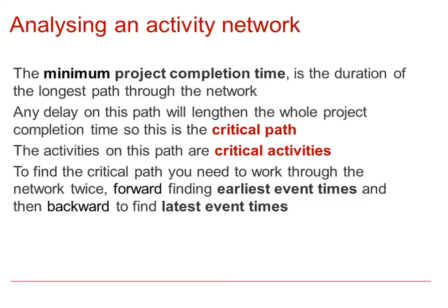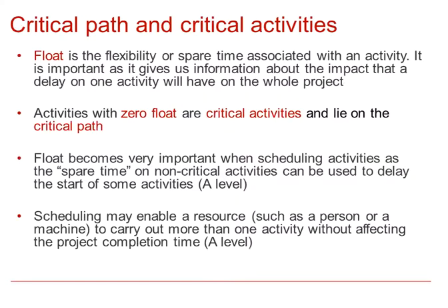So, the delay on the longest path will lengthen the whole project completion time, and this is then the critical path. And the activities on the path are called the critical activities. We defined float as the flexibility or spare time associated with an activity. It is important as it gives us information about the impact that a delay on one activity will have on the whole project.